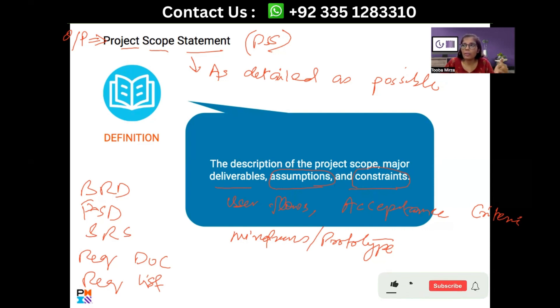So what is the constraint? Constraint is a limiting factor that limits your project planning. The popular limiting factors are budget, resources, capabilities, competencies, and some environmental factors. We are going to talk about the environmental factor in the last, in two days class. So anything which limits you, constraint.